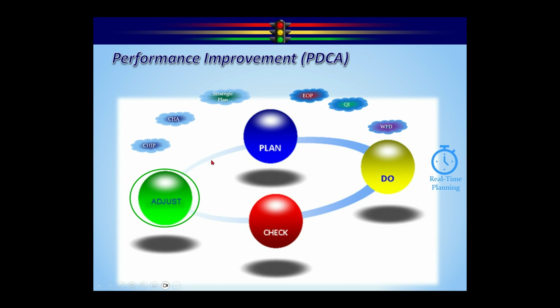So in this case, we're going to say, hey, maybe if we do 12 training sessions a month versus 9, maybe there's more tobacco vendors out there we didn't know about. Maybe there's a whole other set of activities we haven't thought about yet to get there. So we're going to adjust the resources to get to the plan. And then the fourth option is kind of in between. Maybe we take the plan down a little bit, say to 23%, and maybe by going to 12 training sessions a month versus 9, we can get to 23%. So those are kind of the options. The nice thing about the PDCA cycle is it keeps your plans up to date continuously.